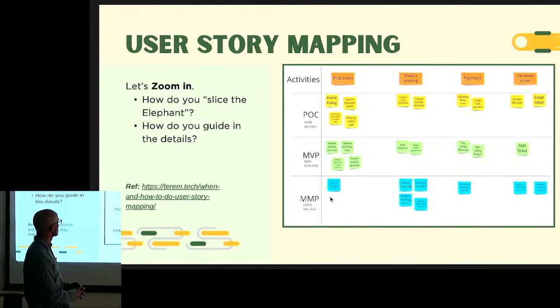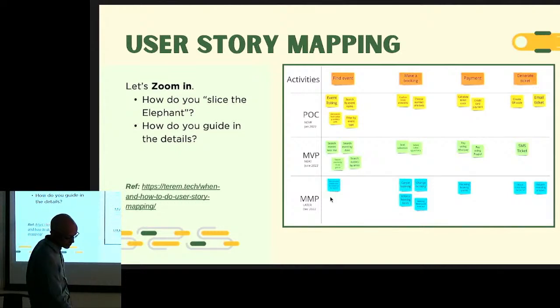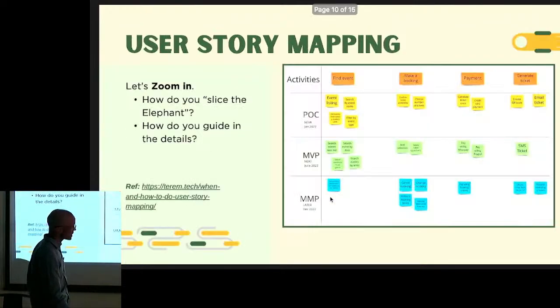That's for high level stuff, but when you're splitting releases, user story mapping I think is really useful for engineers. Maybe some of you know it. Does anyone know user story mapping or use it? Yeah, so it's pretty common in the workplace. Your horizontal lines are your releases, like we saw in this slide here, product plans. You can split those into releases at the bottom. So these horizontals mark your releases.